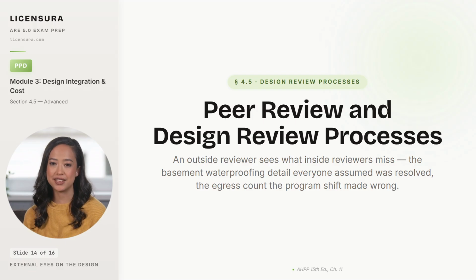since schematic design. When peer review catches a code violation post-permit, the architect is personally liable for the redesign cost and the schedule overrun. And the owner's lawsuit names the architect, rather than the building department. Catching the violation before permit is cheap. Catching it after is expensive.